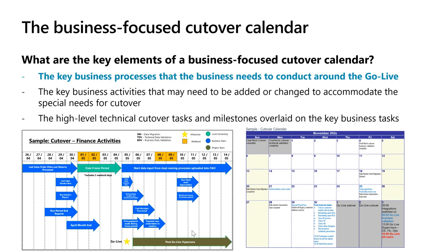These are real customer examples that we've obviously cleaned up and simplified so we can show on the screen here. But essentially what it's saying is, around the time of the cutover, what are the business activities that are going to be going on that could impact that cutover? What is it that's happening? What's the framework within which this cutover needs to happen? And this is a really important thing that you're going to be doing at the beginning. You may not know all the details of how the technical migration will work, but what are the business activities that are going to be happening.